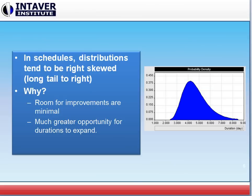Now one of the things that I did mention is that in schedules distributions tend to be right skewed, and that means they have a long tail to the right. The reason for this is that there is minimal room for improvement. That means if we have an activity that's supposed to take us five days, we could probably improve quite a bit on that. We might be able to finish it in three days if everything goes absolutely perfectly.